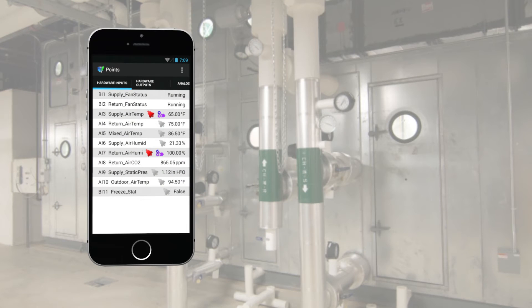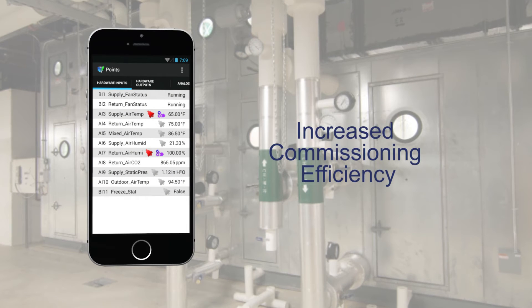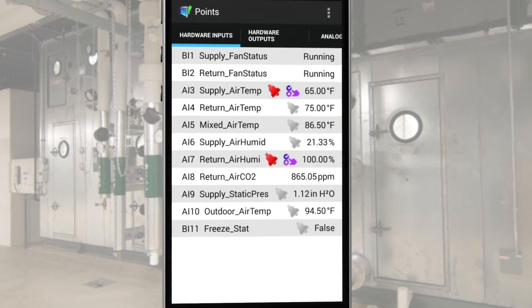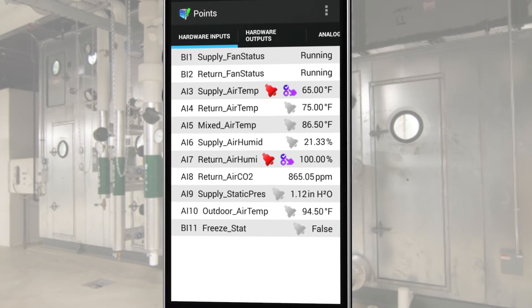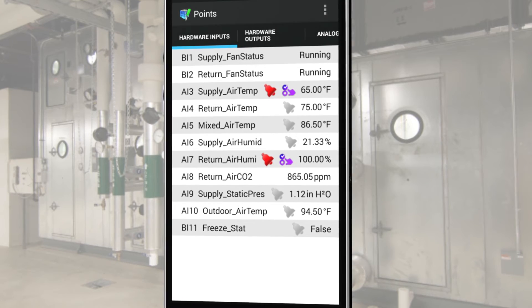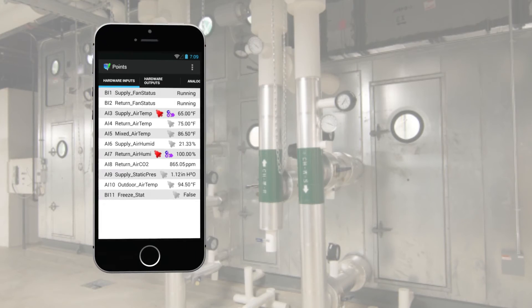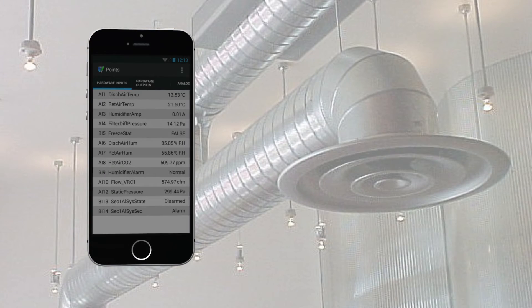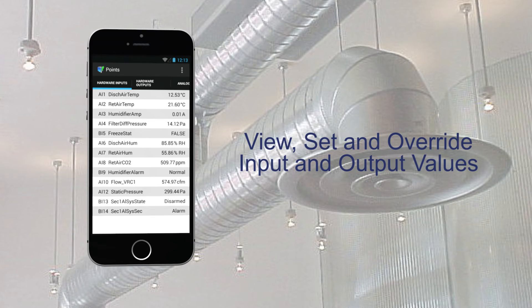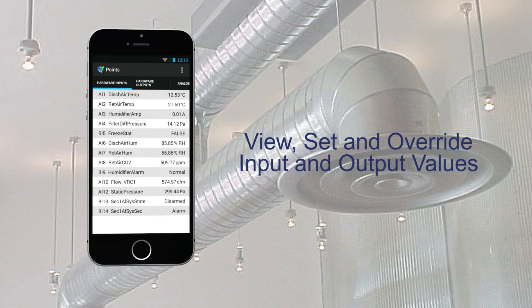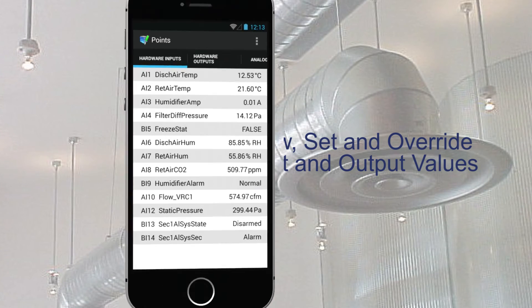The MyDC Control app is an invaluable tool for increased commissioning efficiency. Walk over to the equipment being commissioned and test its operation firsthand, while using MyDC Control to view, set, and override related input and output values.